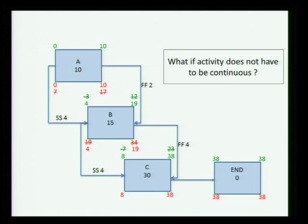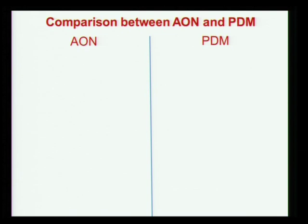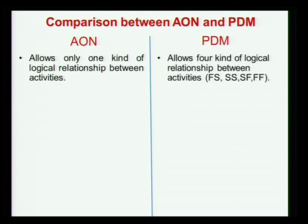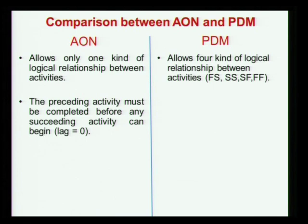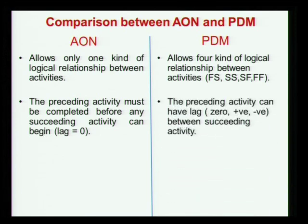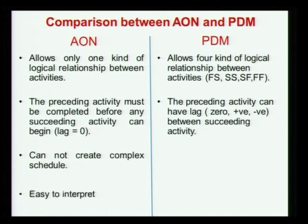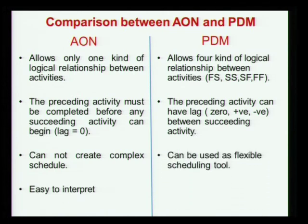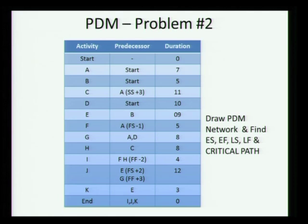We will discuss more on these issues as we get into tools and software packages. If we do a comparison between the two: AON allows only one kind of relationship, while PDM allows three additional types. With AON, the preceding activity must be completed before any succeeding activity can start, whereas PDM allows lags and leads. AON cannot create complex schedules but is easy to interpret; PDM offers flexibility but can sometimes be difficult to interpret. I will give you a problem to work on and we will solve it in the next class.